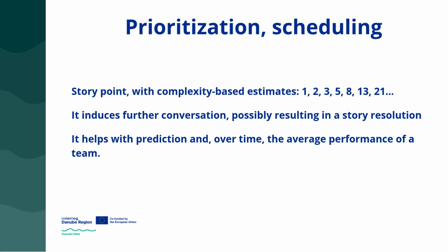In reality, user stories are not estimated based on time. We do not measure how long it will take to implement them. Instead, each user story card is assigned a story point value, which reflects the complexity of the task rather than the exact number of hours required.